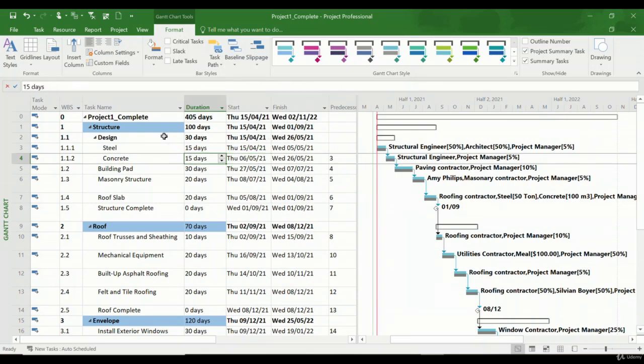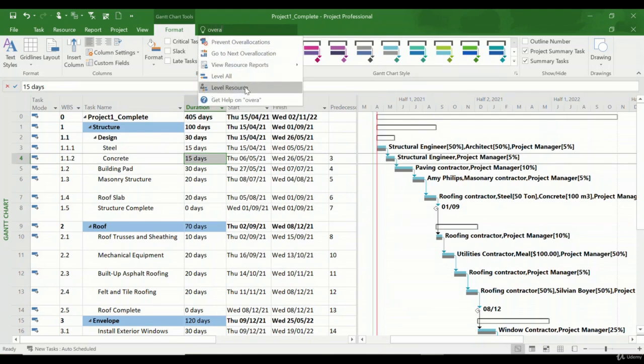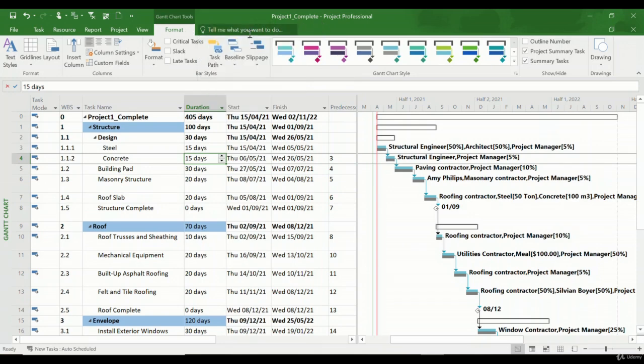If you are lost in the project and you don't know about anything, you can just type it here. It's always here. Let's say if I say "over allocated," then it says, okay, level resource over allocation. Then it says how to prevent and use the over allocation. We can also view resources. So it's important to use this really useful toolbar that is provided here.